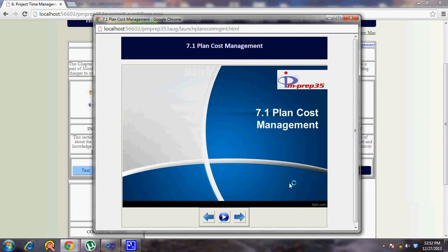Probably cut down the requirements or increase the timeline so that the cost and time match up. So your cost baseline is an agreed factor which is a balancing of different project objectives: scope, time, cost, quality, and all that. Based on that, your cost baseline is agreed, and you do all that to preserve that cost baseline in terms of not breaching it, adding new requirements, or going over the cost agreed.